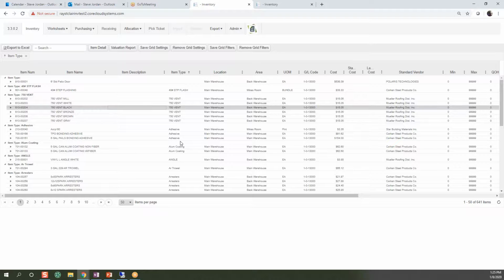So it gives you a price book, or a basis book, to start your estimate with. And then you can feed that estimate back into the system and go through the whole purchasing functionality, the request for bid functionality from the BOM, or the bill of materials, that comes from the estimation process that you have. So we're incorporating a lot of that here.